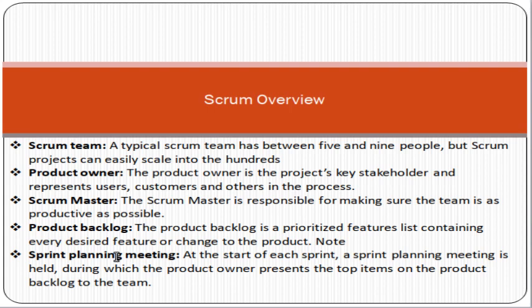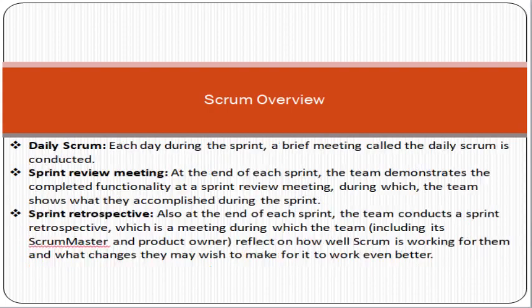This is the meeting called the sprint planning meeting. In the meeting you take the requirements from the product backlog and decide that you will do those tasks in the sprint. After the sprint planning meeting, you make the sprint backlog. A sprint backlog means the requirements, the user stories, which you are going to implement in the next sprint.